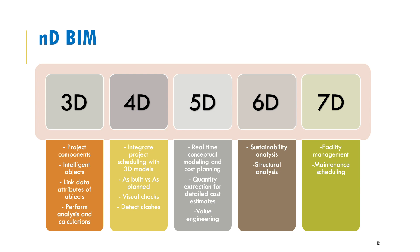5D BIM is used for cost estimation, linking unit costs associated with materials and workmanship to the model. 6D BIM is concerned with sustainability analysis — for example, conducting daylight or solar analysis of a building. 7D BIM involves using the model for facility management, where the person responsible for operations can utilize the BIM model to run the facility after project handover.